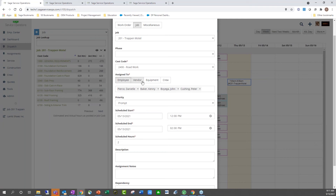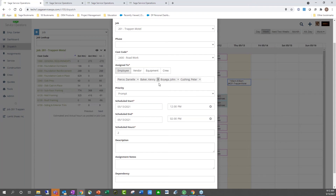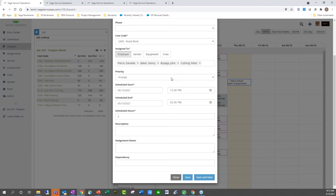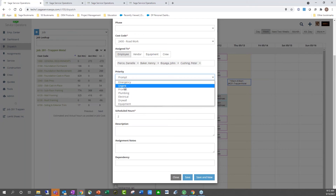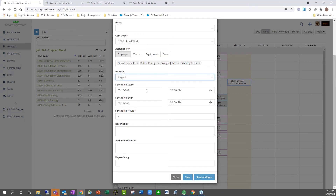There are also options to add vendors — for scheduling purposes, you can have them notified automatically through email if you have different vendors or subcontractors coming out to the job. You can also schedule out equipment, which is just the allocation of equipment for each of your jobs. If you are using a priority, you can choose it directly here, and this would reflect the list you have within 100 Contractor. Down at the bottom, there are options for entering a scheduled start and end time or a scheduled amount of hours — you can do one or the other, you don't have to do both.